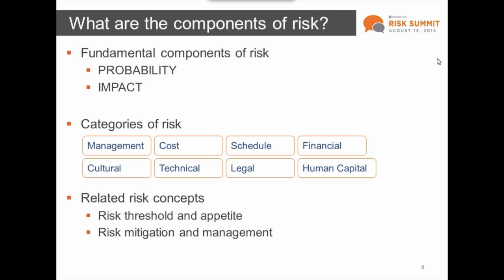These considerations are always unique to the type of decision and process. So, for example, as a project manager, some of my planning considerations may change. As a result, the level of risk that I see in one area is no longer in the acceptable range. We would then need to apply new or augmented mitigation measures to try to reduce the level of risk to a level within my risk appetite.